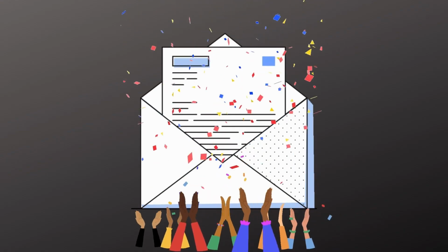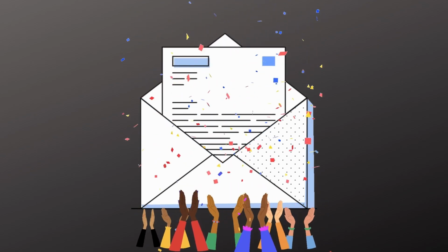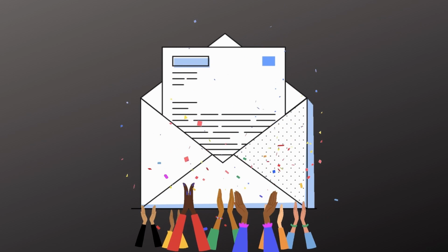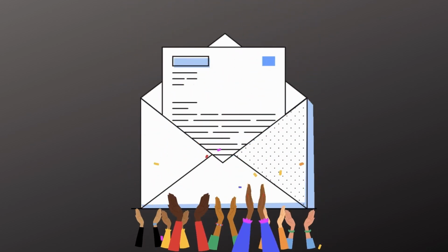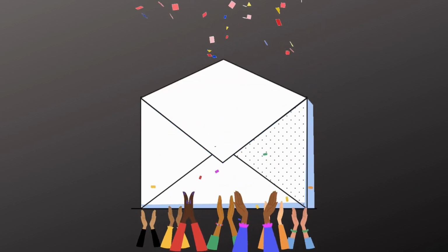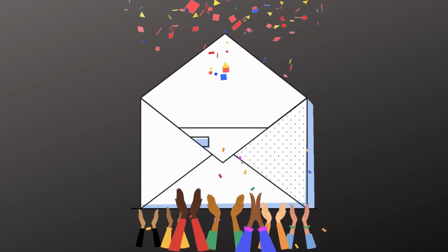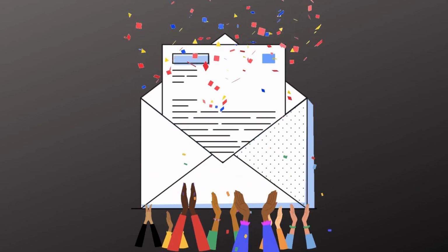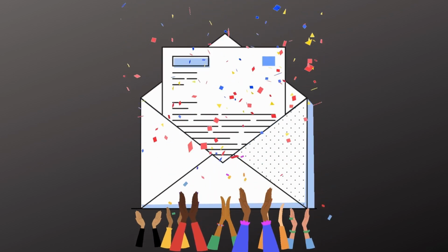The last step is to get the permit. After doing all of the drawings and documents, now it's time to get your permit. If your architect is going to deal with the city, then it's totally fine. Otherwise, from the beginning of the project, contact the city via email and ask for the process and list of documents. Also make sure about the drawing and document submission process because some cities accept online PDFs and all, but in countryside small cities they don't accept PDFs.